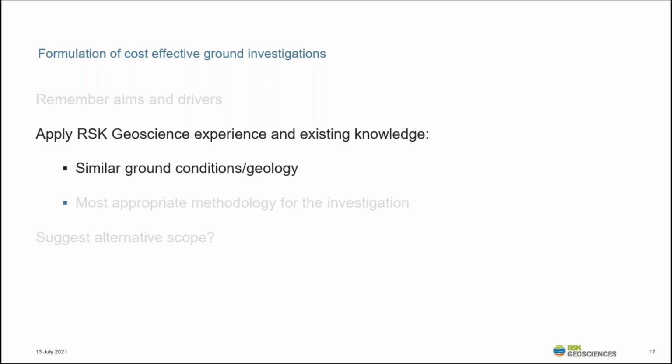Have the ground conditions there yielded certain results? For example, have the holes tended to refuse at a shallow depth? Can more holes be undertaken per day? And what is the most appropriate methodology for the investigation based on your knowledge of the site and of the area?